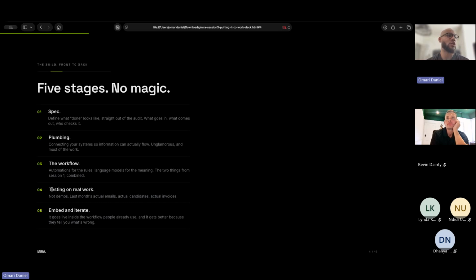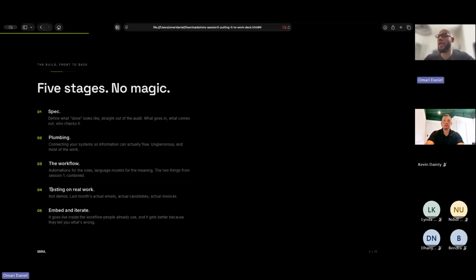So whatever you build, make sure you bake into the timeline a period of potentially a week or 2 weeks purely for testing. And I think the expectation with the decision makers should be scaffolded from the beginning of the process. So they know, okay, we've got the system built, we are now entering an allocated test phase. This is something that is on the people who are working with the provider to lay the foundations for that context to decision makers, because decision makers, once they've heard the product is built, will expect it to just be the magic box that they've paid for. It's very important that from the planning phase, you've scoped in time for testing.